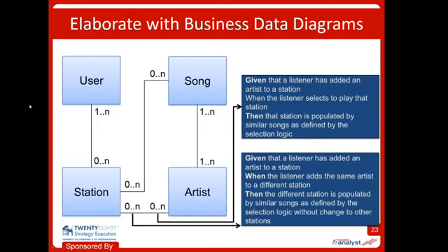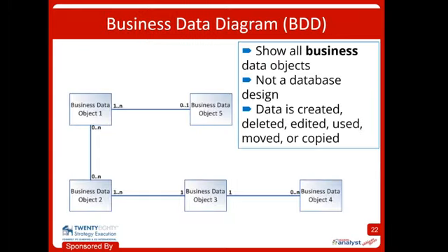And if I go through and ask that of every single one of them, I just cross off to say, do I have those user stories or not? If not, I create a user story. Like maybe I forgot the create song user story. And then I do the same for those other, I'm going to go back a slide, those other 6 verbs.